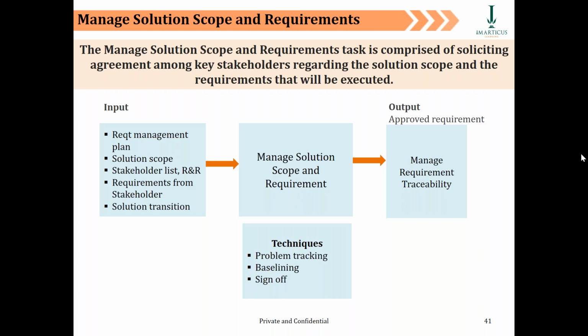So obviously, Pankaj, this additional thing must be in your BRD also, because otherwise, how will you justify that you already have baselined, and this is something which is beyond baselining, because you have to bill it back to the client. But now these additionals which have come in are also part of the contract. They have been added to the contract as an addendum. So your solution scope will be reflected in your BRD, but that is going to be for baseline and beyond baseline requirements also.